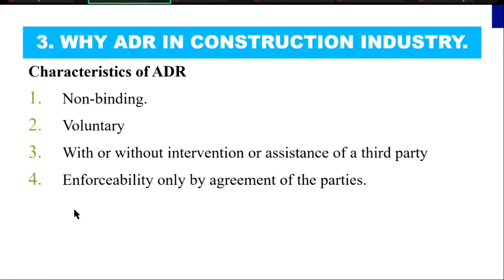So the dispute board, this is a board that in FIDIC and in other jurisdictions is supposed to be appointed at the beginning of the project. Of course, some are appointed when a dispute has occurred. But when they are appointed, the party submits to them their issues in details, and then they look at it. They assess, either in dispute avoidance, or they review the dispute and make a determination. And that pushes me now to adjudication.